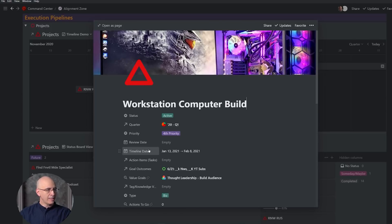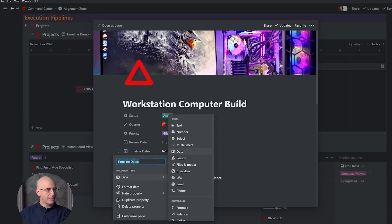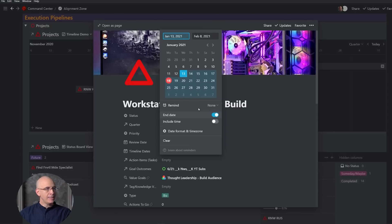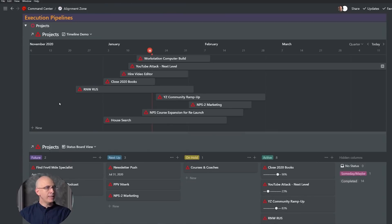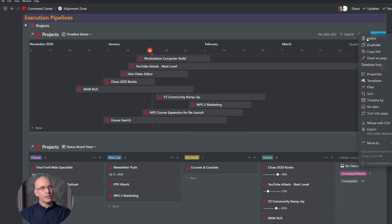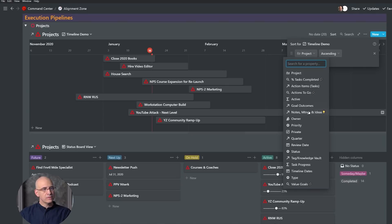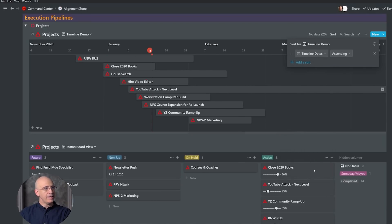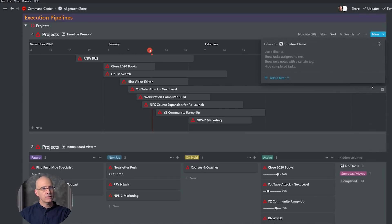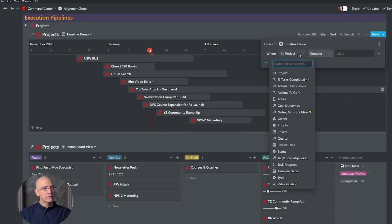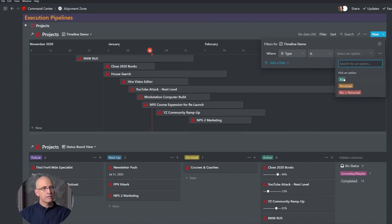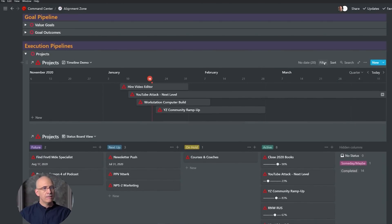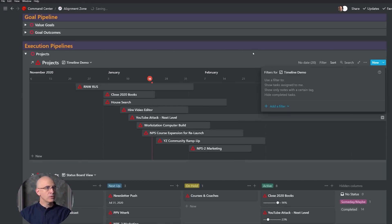Now when you first do that, each of these is probably not going to have the timeline view beginning and end date set properly because you're unlikely to have been managing that already. So go ahead and add a Timeline Dates property—just add a property and make it a date property. Jump in, add an end date, and then for each one add a start and end date. Just throw something in quick, don't worry about it. Once you get to this view, you can adjust the end dates and drag them and resort them in any way you want.